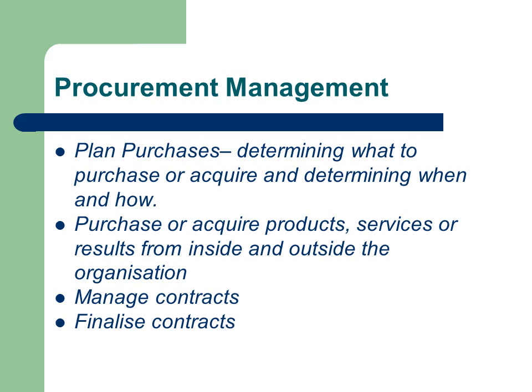Procurement management. Procurement management involves the management of all activities associated with the identification and acquisition of goods and services required for the project. Project purchases must be planned according to the procurement guidelines of the organization and integrated into the project schedule. Procurement processes may be formal, that is, tendering, or informal, such as quotations, or using preferred suppliers.